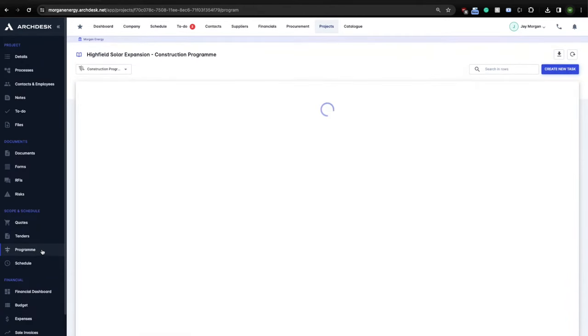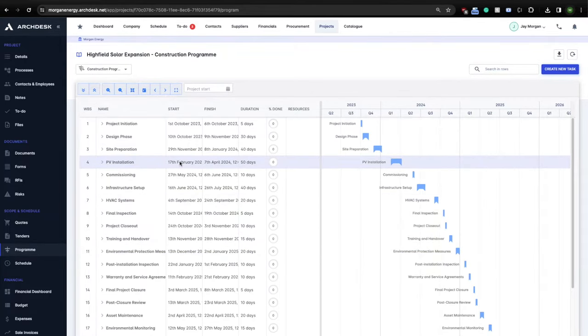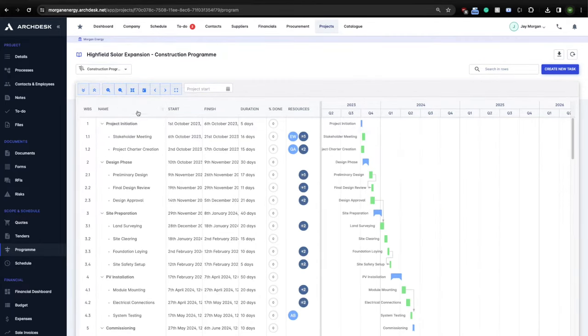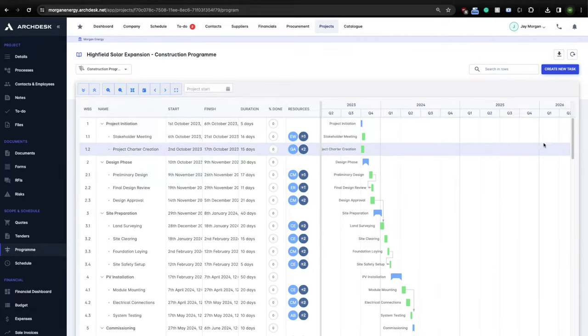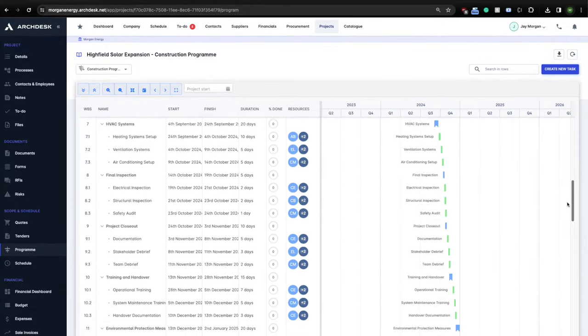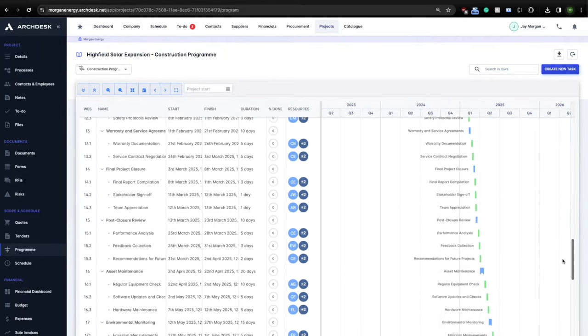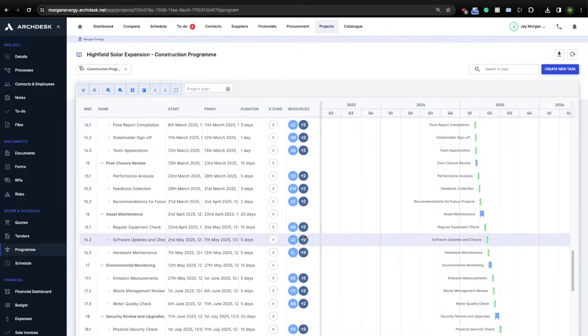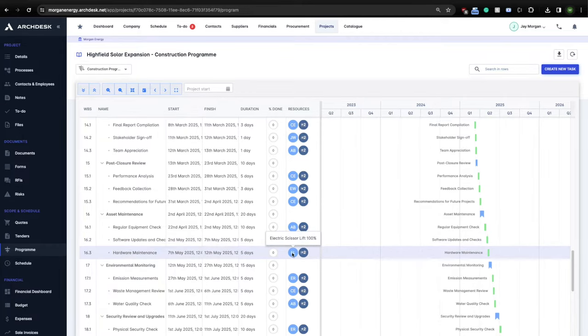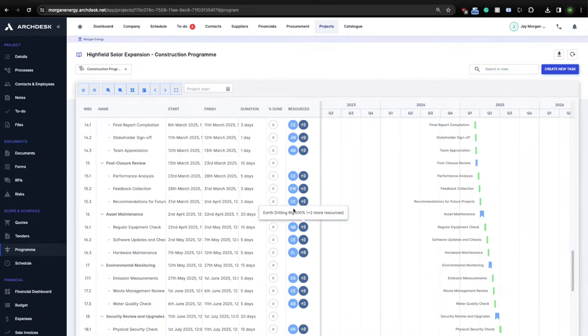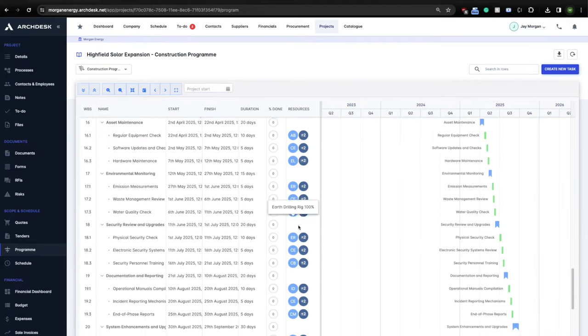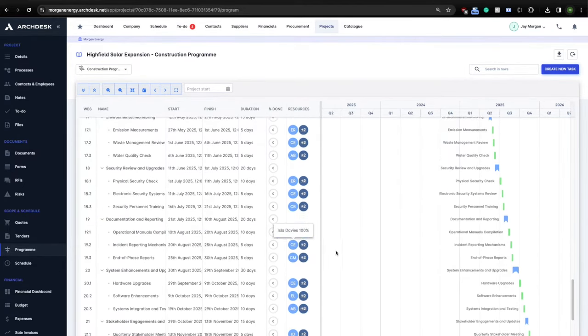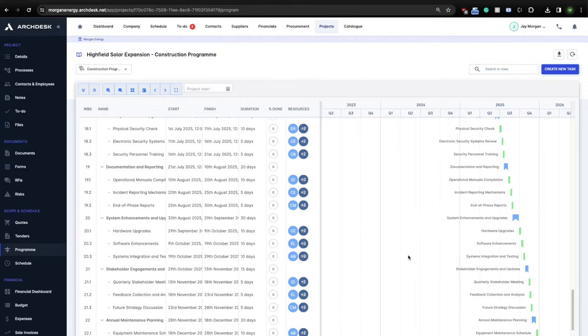Let's take a look at project scheduling. As you would expect, ArcDesk has a full Gantt chart module allowing you to freely schedule your workforce. Each project can contain multiple programs. Programs can be created directly in ArcDesk or imported from the likes of Excel, MS Project, Primavera P6, or ASTA Power Project. Against each task, you can allocate not just your workforce contractors but also assets, like a heavy machinery or vehicles. ArcDesk programs support all kinds of constraints against tasks for the purpose of critical path programming.